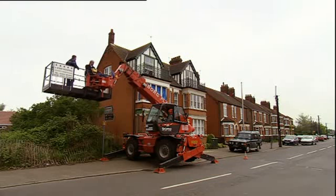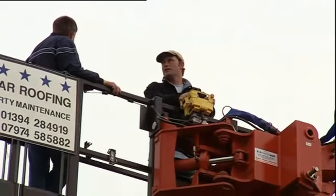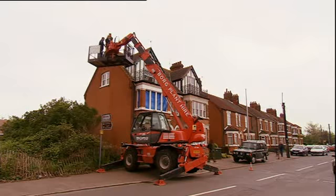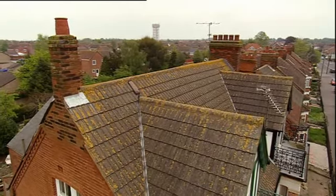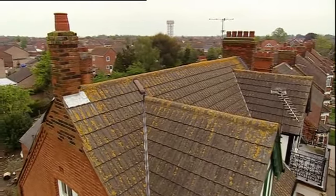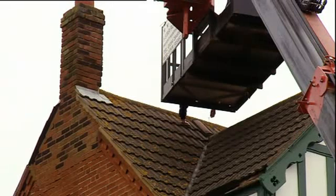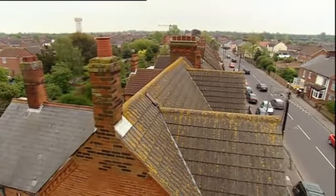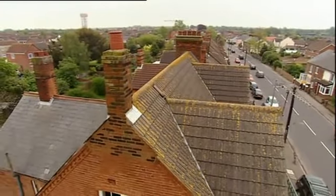No, not me anyway. This is a major problem and one they should have seen coming when they bought the property. The surveyor told them the roof would need replacing, but they didn't put a penny in the budget for any repairs. And the bad news doesn't stop there. You've got nail fatigue up there now, which means the slates will just slip all the time. I'd advise you to strip it off and have a re-roof on the back, really.